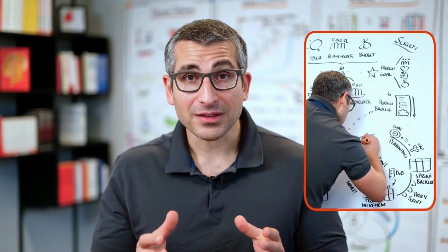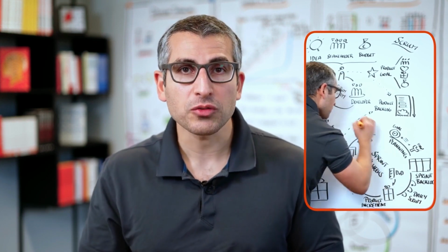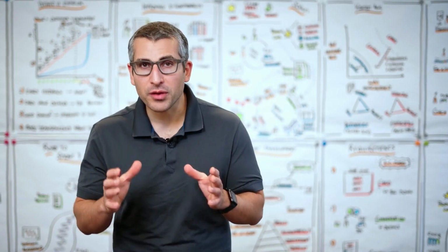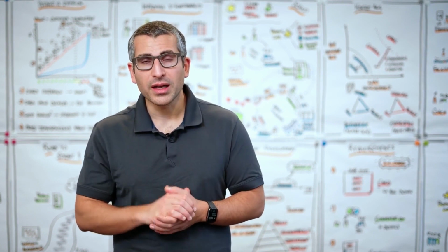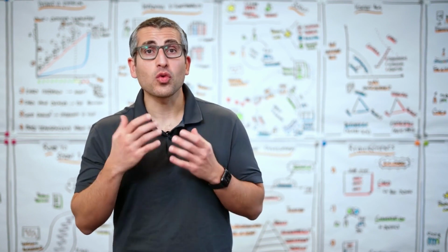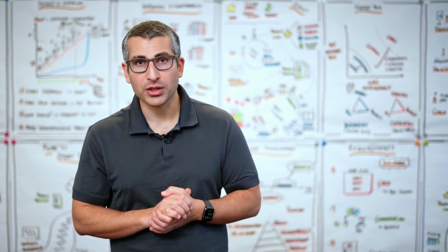The final event, the final meeting during our sprint is the so-called sprint retrospective. Compared to the review, where our focus is completely on what we are going to work on, the retrospective covers how did we work together? How can we improve our collaboration? The Scrum Master facilitates this event very actively, and there are various approaches to do this.